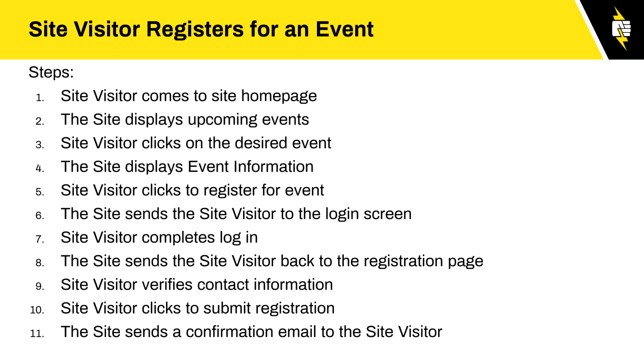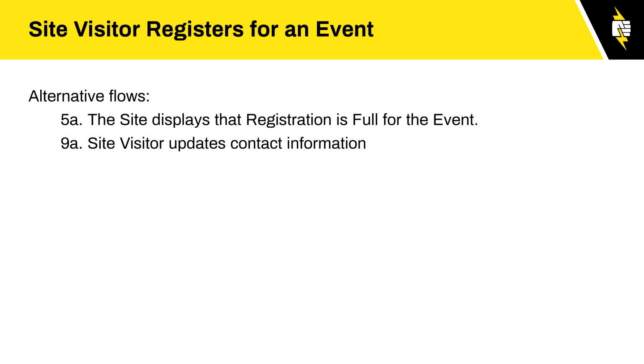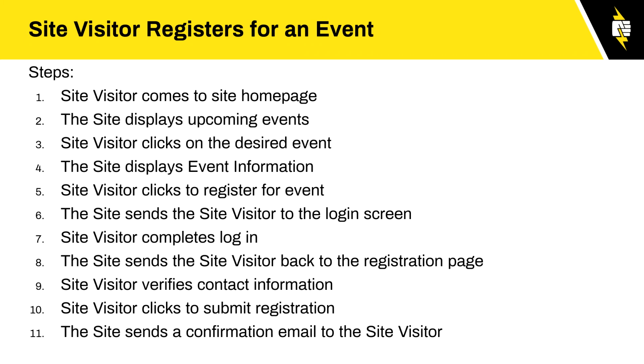We have this. You could either turn this into BDD testing very easily, or you could give this to your QA team and they could run through it. And they also have their alternative flows right there documented. So you already have all of that done that you can just hand off. And you don't have your developers writing the tests after they've done the work. You've got this ahead of the work being done.